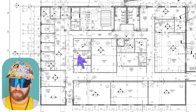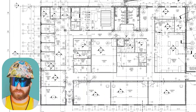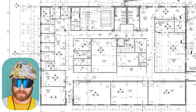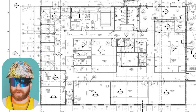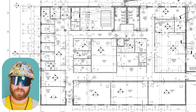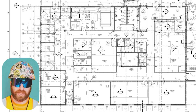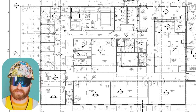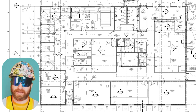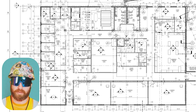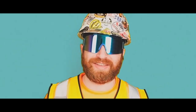The next step is clicking all the details and completing the same process for all these pages. Then you move on to another drawing discipline, take all the details you figure out from those disciplines, and coordinate them together. You take the multiple disciplines and then you start to sequence the work — what is page one, page two, page three? You can't paint your walls until they're taped and finished. You can't tape and finish until you install drywall. You can't install drywall until you've installed your wood or cold-form metal framing. You get the point.